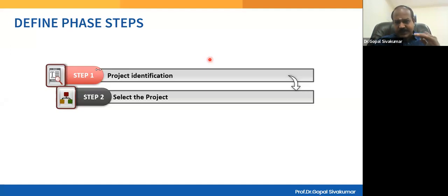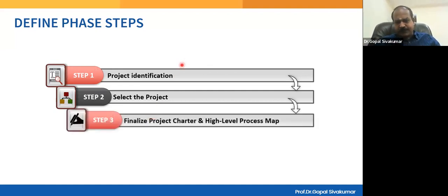They are nothing but the strategies. If the strategies are made clear, accordingly we can choose projects. We can order the projects based on the organization's priorities. Once these basics are clear, you know how to use the tool. A simple Excel table can prioritize the projects properly. The first project is this, because this has a huge impact on this particular strategy. So likewise, you can convince your management. That is step number 2. And then finally, once you have proper order of execution, then for every project, a format is required.